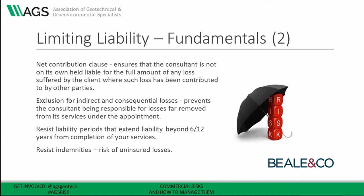Do watch out for indemnities. These tend to be inconsistent with your professional indemnity insurance, as they allow the indemnified party to recover all of its losses on a pound-for-pound basis without having to meet the usual tests at law of reasonableness and proportionality. Indemnities are a significant risk as well.